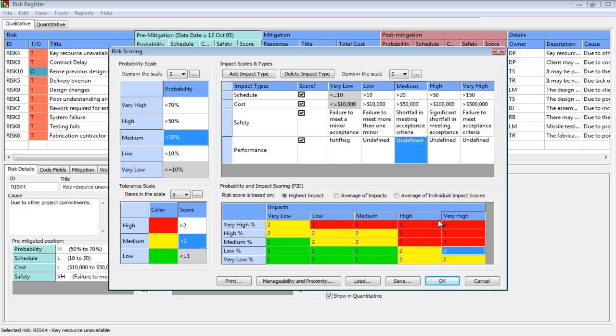So, if when your organization put them together they had no meaning, then they have no meaning. If there's a statistical formula behind what the numbers mean, that may be the case as well. But when you look at that, these numbers correspond to this tolerance scale. So the theory is it's a stoplight system. The green we'll ignore. The yellow ones we better look at. And then the red ones, those are an unacceptable level of risk.